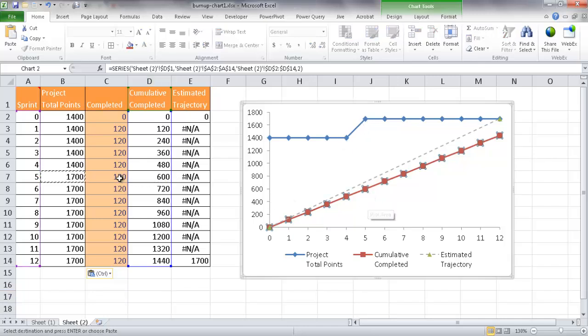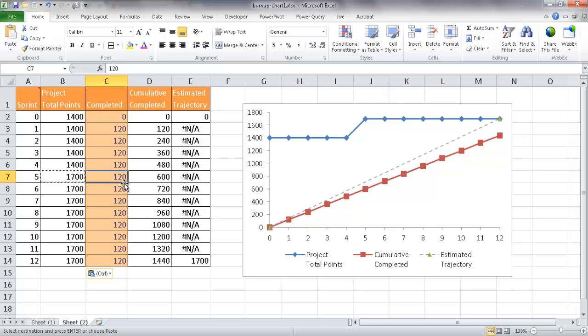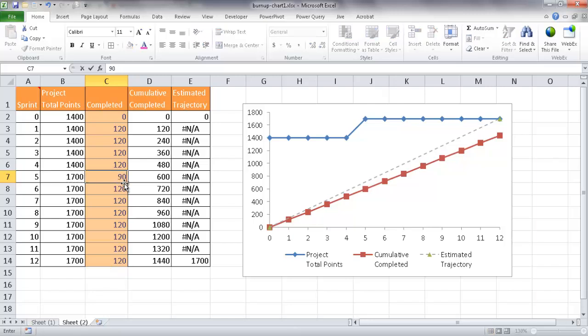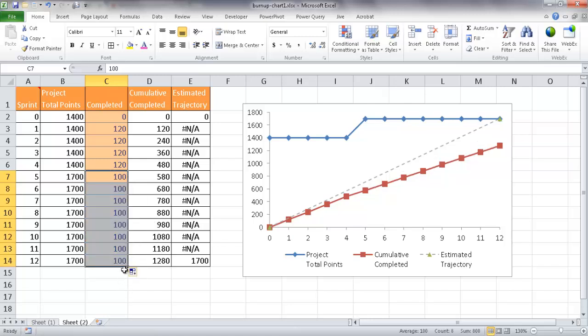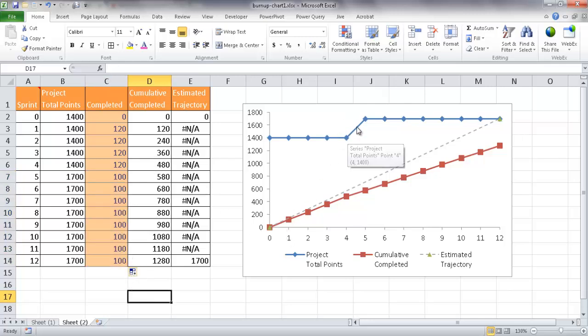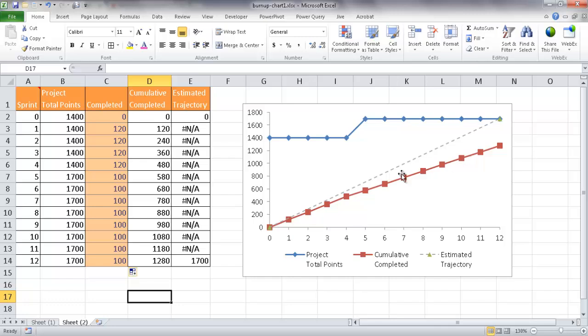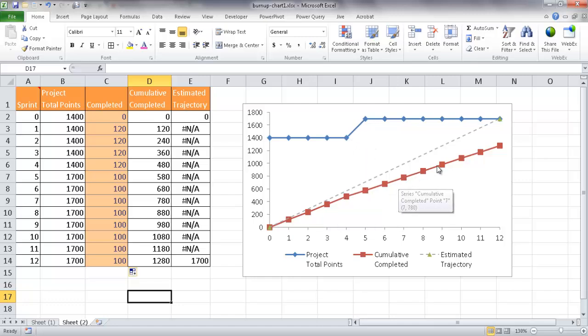So now with the scope creep increasing in there, maybe at number 5 here, maybe the completion has gone down because we don't have enough people to do the additional work. So that might have gone down to 90 or maybe 100, right? And then that's gone down to 100. And maybe that has kind of brought it all down to 100 there because the additional work to do something has brought it down. And so now we can see that with the additional increasing requirements or some scope creep, we have some of our cumulative completed going down. And so we have our estimate trajectory here at this straight line. And we've noticed that since we introduced some scope creep, our cumulative completed has gone down.